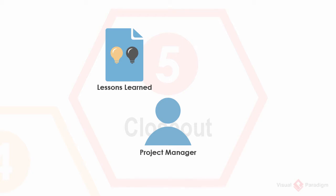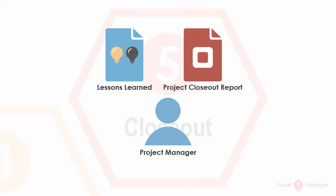Another document to develop is the project closeout report, which consists of studies of variances between the actual and baseline performance goals, project cost, and schedule. It also includes a description of the ongoing operation and maintenance plan.